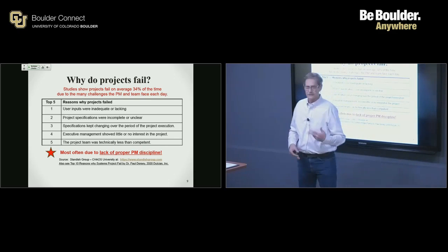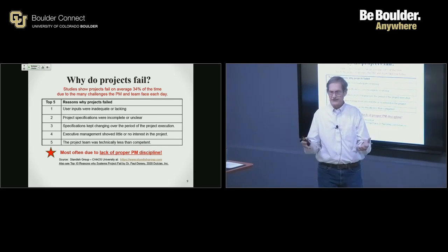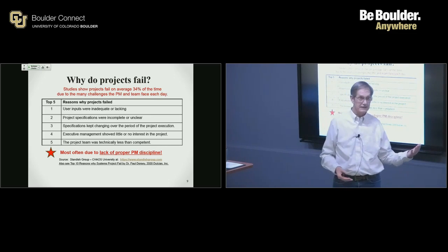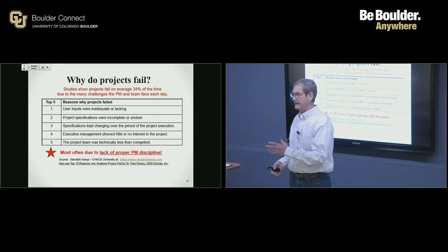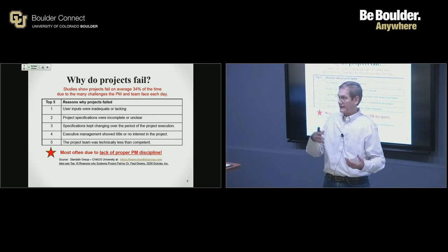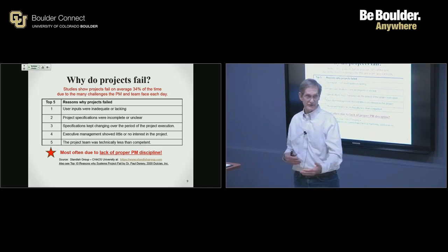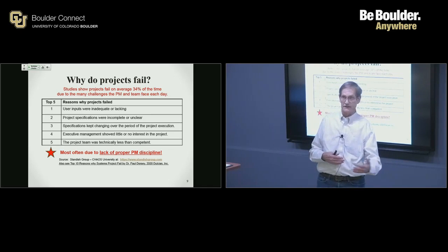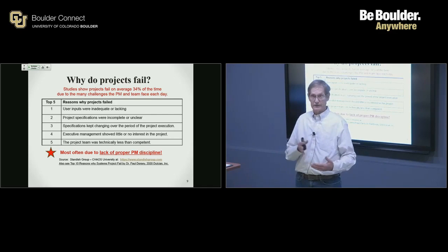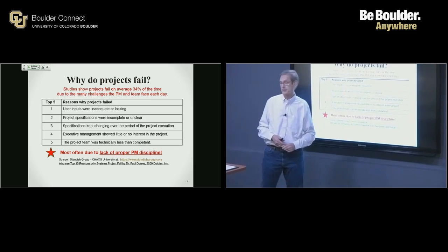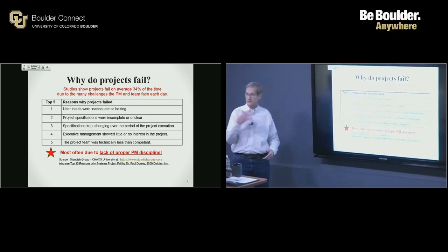Okay. In the old days, we used to develop the project scope, get it approved, put it in the drawer. Nowadays, the view is you need to validate the scope along the way. Get the original approval, but after every deliverable, hey, is this what you had in mind? Put those blueprints out there. Is this what you had in mind? If not, we need to know before we continue down the path. Otherwise, you're wasting a lot of time and energy, certainly a lot of cost, if you have to restart the project.